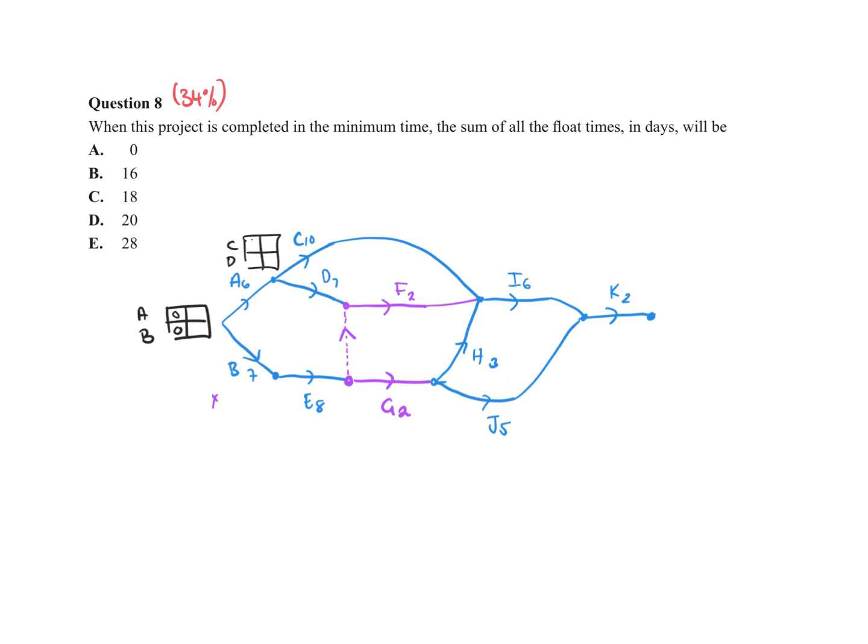When I get to this point, I have either C or D. Now, they both had to wait for A to happen. If I look here, E had to wait for B, so there's 7. Now, I get here G, so 7 plus 8 is 15. And if I go along here to F, F would be 6 plus 7, which is 13. But we've got this 15 from there. It has to wait for G, so 15 goes in there.